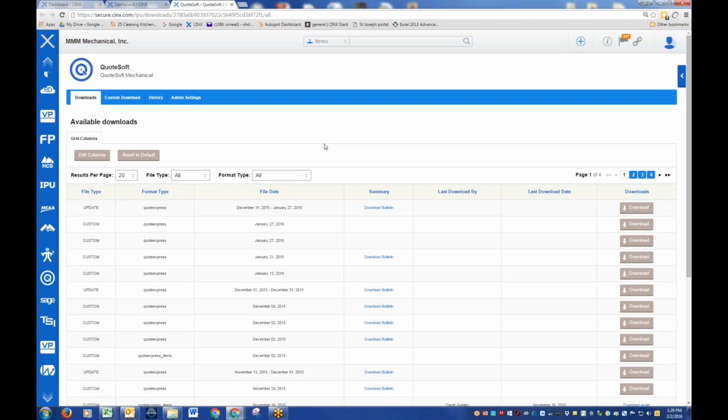So that's always a possibility. Another phase is obviously when you get sign-off from the engineer that says, yeah, we're going to sign off that floor, and we're going to release it so that you can begin fabrication, whether it's prefab or fabrication on site. And you're going to start procuring some of these elements.